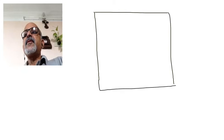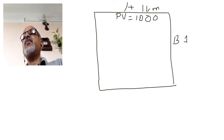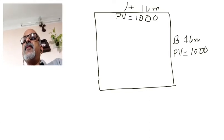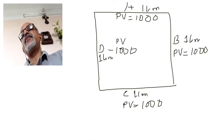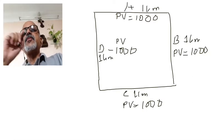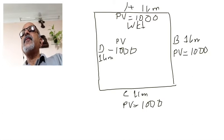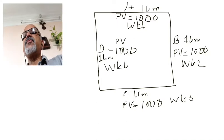This is Side A — it is one kilometer and has a budget of $1,000. Side B is also one kilometer with a budget of $1,000. Side C is also one kilometer with a budget of $1,000. Side D is also one kilometer with a budget of $1,000, which is known as the plan value. Side A is to be completed on week one, Side B on week two, Side C on week three, and Side D on week four.